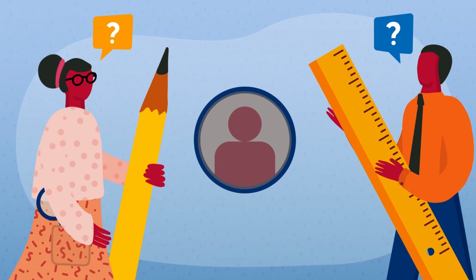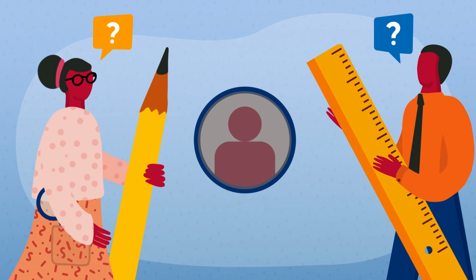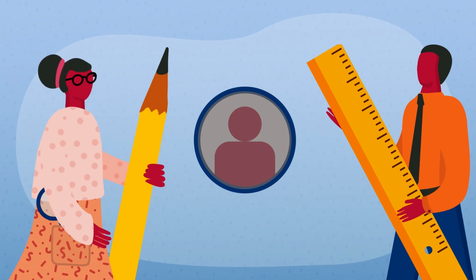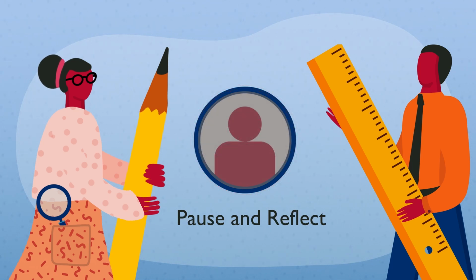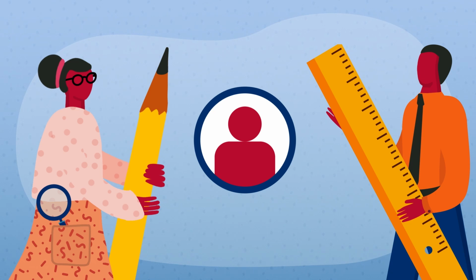You and your team come together weekly in team meetings, and you ask for their thoughts on how the project is going. The team agrees that it is concerning that the evaluation is falling behind schedule. One team member notes that whenever you are on a call, the client provides specific and useful answers to questions. Going forward, you plan to pivot your communication approach and request weekly meetings with the client so that you can get information you need in a timely manner.